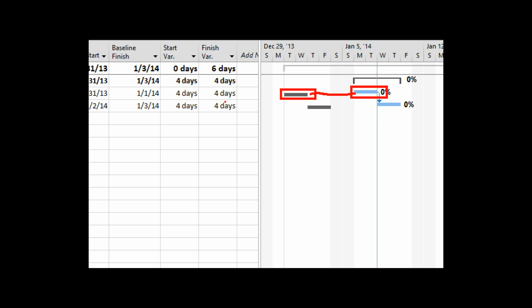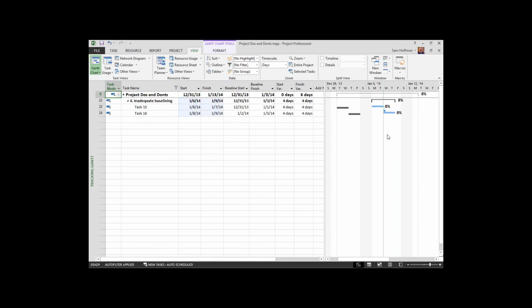Now, if we start working, and the actual work doesn't match up with the baseline work, that's also set when you baseline, then you'll see work variance. If there's a difference in cost, you'll see cost variance. Those variances that occur are because of changes, the differences between existing and the baseline events. I advise you to use your tracking Gantt. That is designed to show you this.